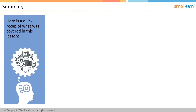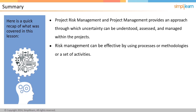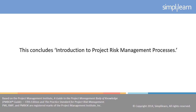Here is a quick recap of what was covered in this lesson. Project risk management and project management provide an approach through which uncertainty can be understood, assessed, and managed within projects. Risk management can be made effective by using processes, methodologies, or a set of activities. Project risk management has six processes: plan risk management, identify risks, perform qualitative risk analysis, perform quantitative risk analysis, plan risk responses, and control risks. This concludes the introduction to project risk management processes. The next lesson covers plan risk management.